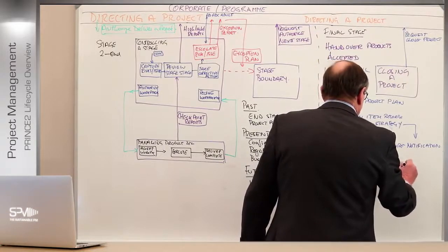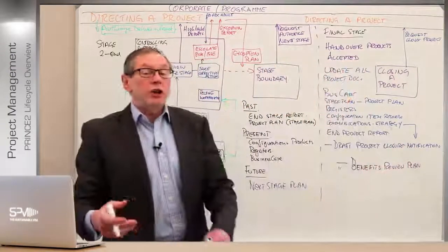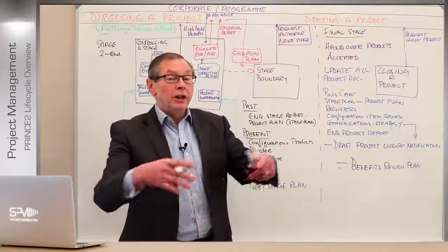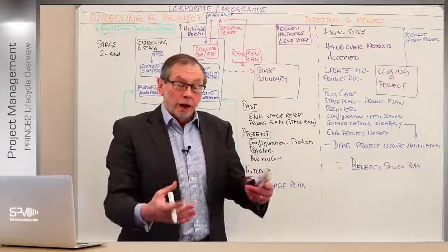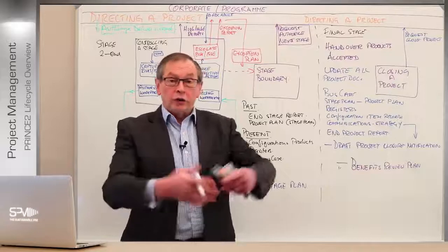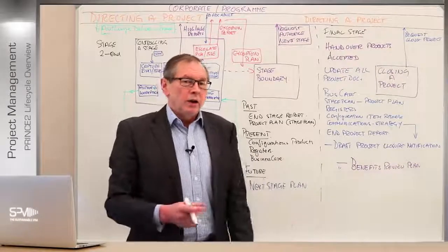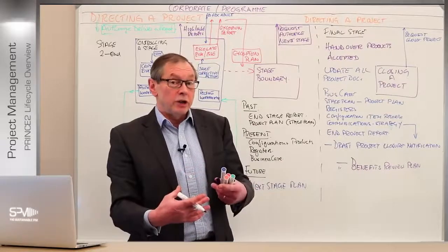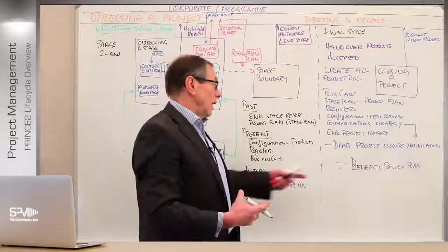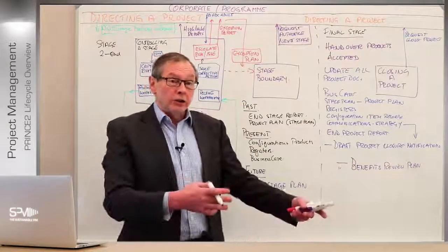And this is why this particular document was never part of the project initiation documentation, because that PID is not going to be wrapped up and filed away when the project's closed, because it's only for the project, in case of audit, when people want to check everything, lessons learned and stuff, which we'll look at in a moment. So all that's part of the project, okay? So that all gets filed away. But the benefits review plan, of course, now is really going to take hold.